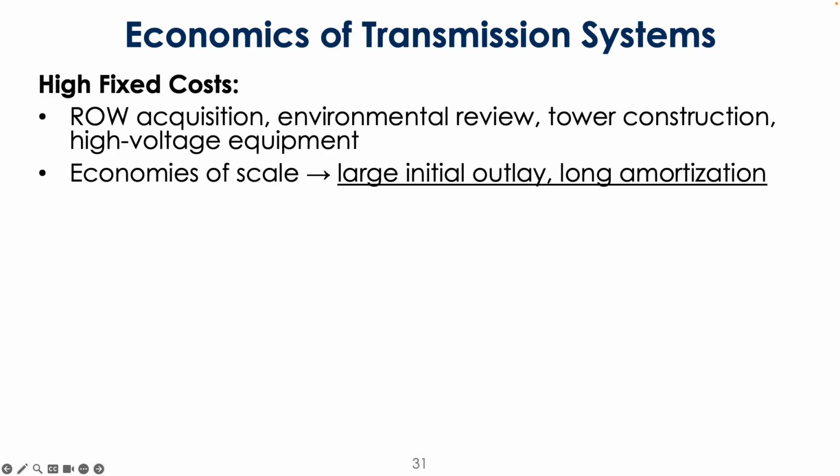Yeah, exactly. There's a famous case of Tehachapi and Chino Hills. They had all those wind farms, and they were going through Chino Hills, but Chino Hills, it was an eyesore for the overhead lines. So just for like 2 miles through Chino Hills, they had to spend like 300 million underground. Yep. And that's a common thing, to acquire right of ways. You're going these long lateral distances.